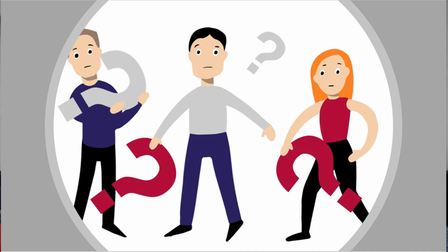Step 5. Implementation and adoption. Typically, the change requests we process in delivery take from a couple of hours to a couple of months depending on size and complexity. We demonstrate the new system behavior to the stakeholders, get their feedback, and use it as a data input for the new change request. We also conduct supporting and Q&A sessions to help the client during the UAT stage. As the scope and the scale of the change in OCM is way broader, the entire transformation process can take years. It will follow the roadmap, which of course can be adjusted many times, and to help the client to adopt the change, the entire supporting team will step in.